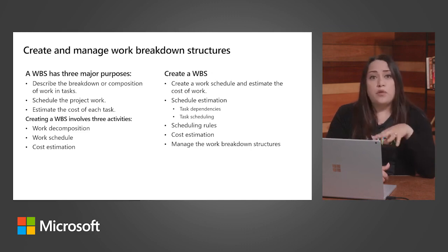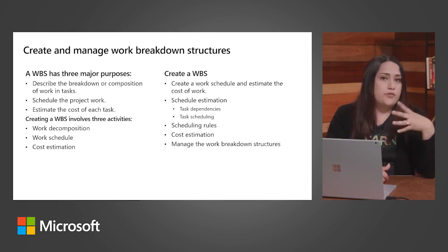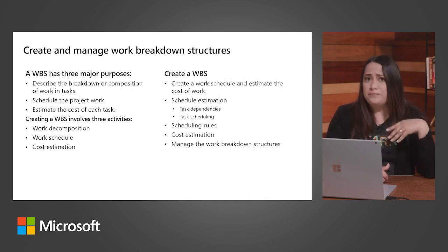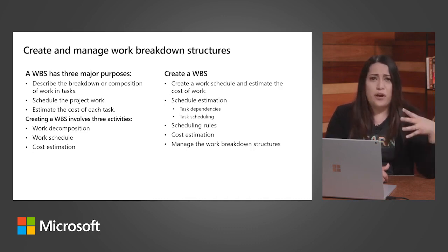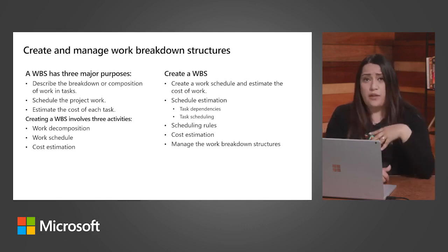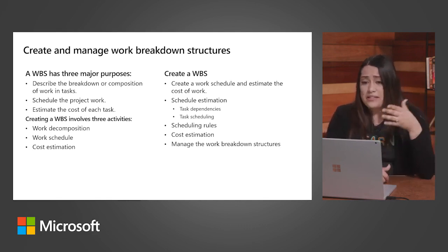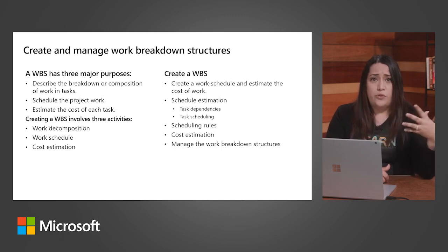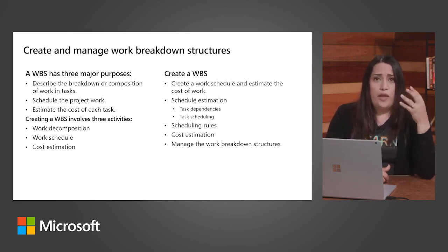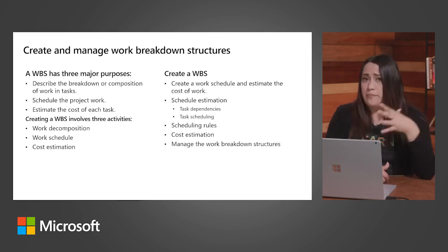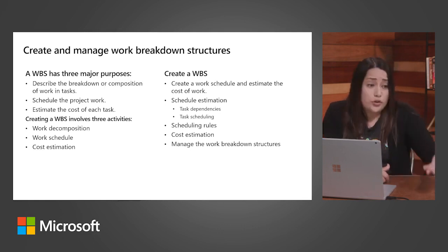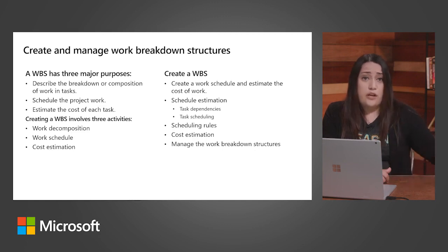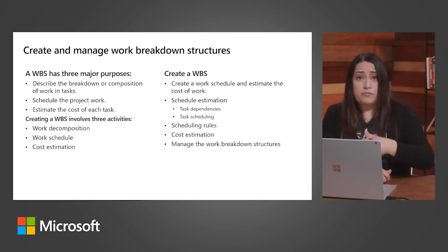And you can use WBS templates to create standard templates for projects. So let's say you have a project that you're offering quite a bit, and it has a lot of repeatable work. You can create a WBS template that makes it really simple to move from one project to another one. So if you have a template from an existing project, all of that knowledge and best practices that you gathered during the planning portion of the project, it's really simple to reuse it on similar projects in the future.